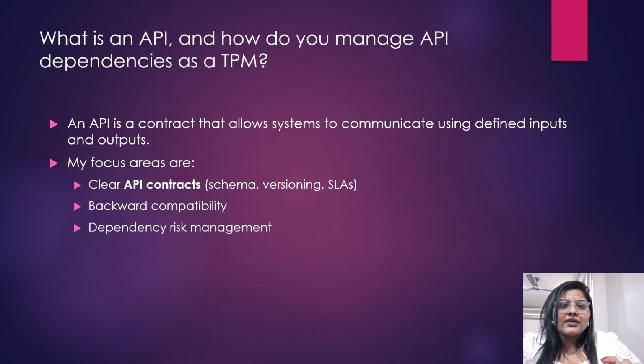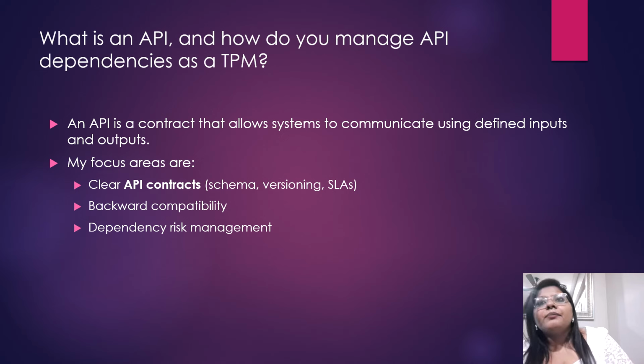The next is dependency and risk management. Which team is delivering when? That is most important. Let's suppose both teams have the same deadline to production, to UAT, right? But team A is dependent on team B, and team B is going to take 6 weeks to build an API. So what we provision is we ensure that the mock APIs are available early, so that team A can also start the work. Then, what changes require versioning? There should not be breaking updates.